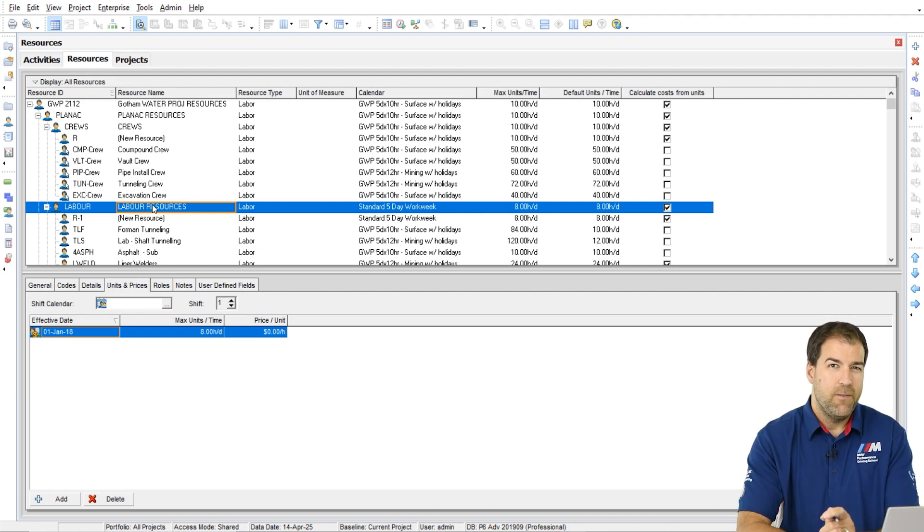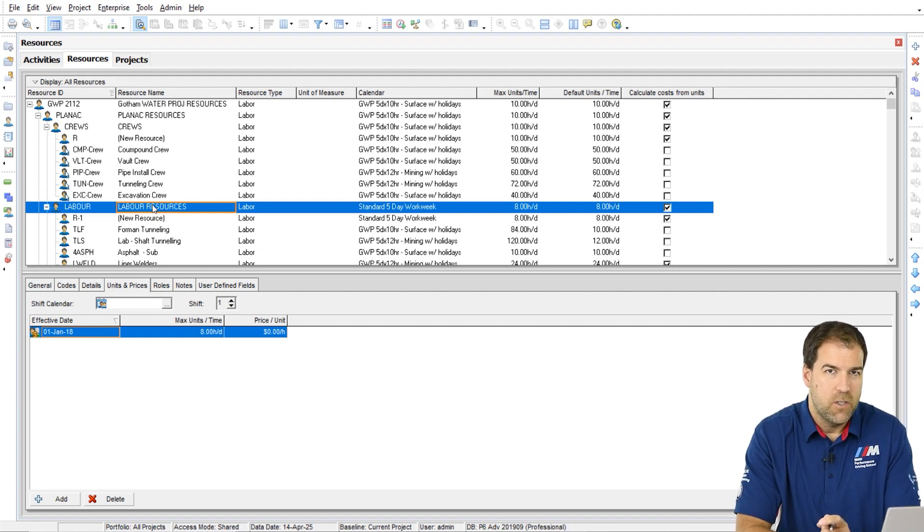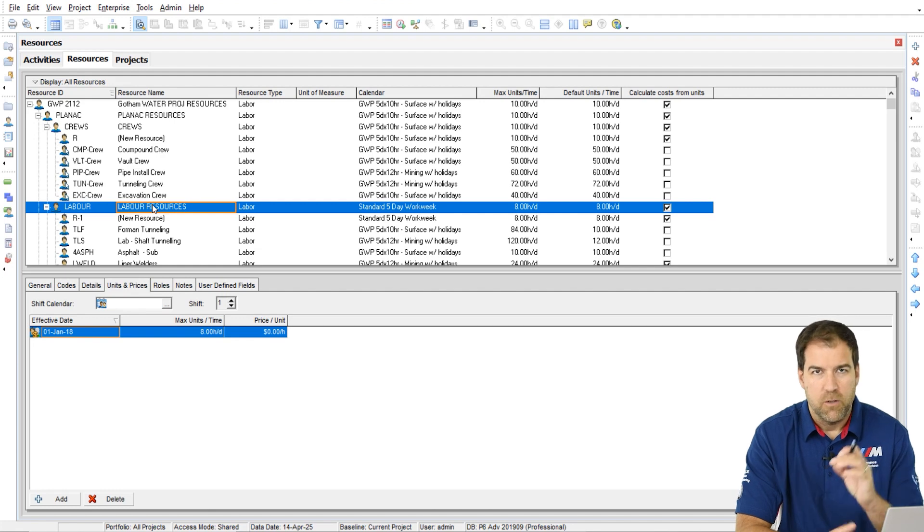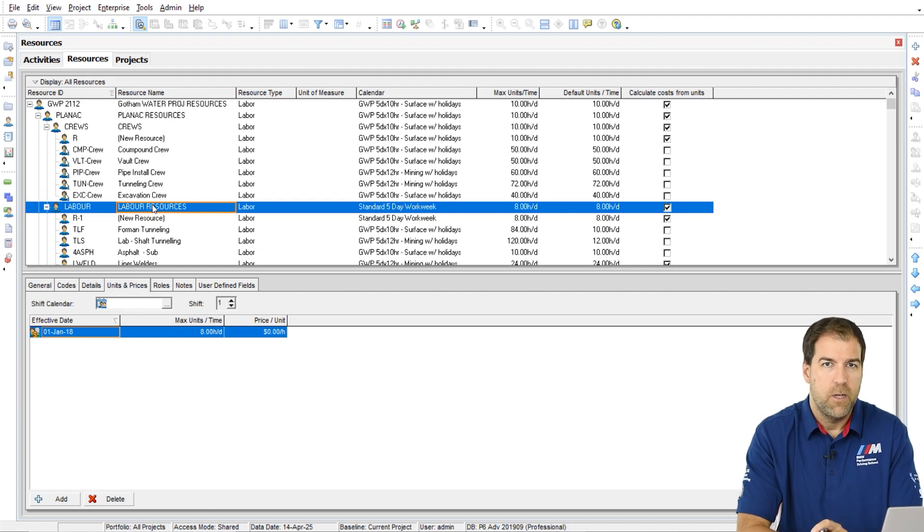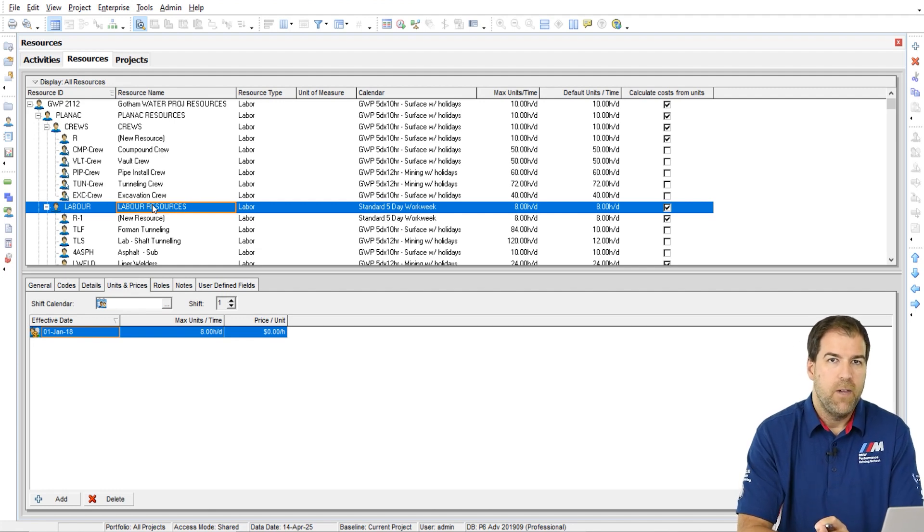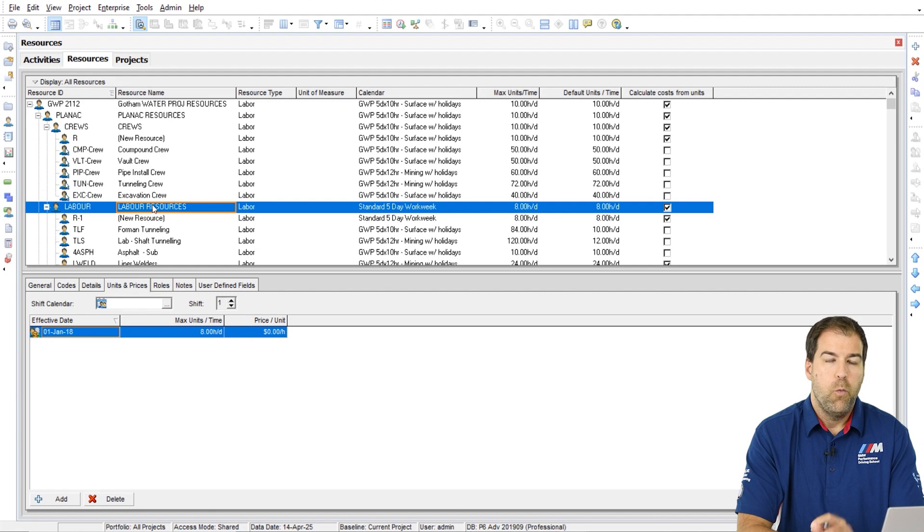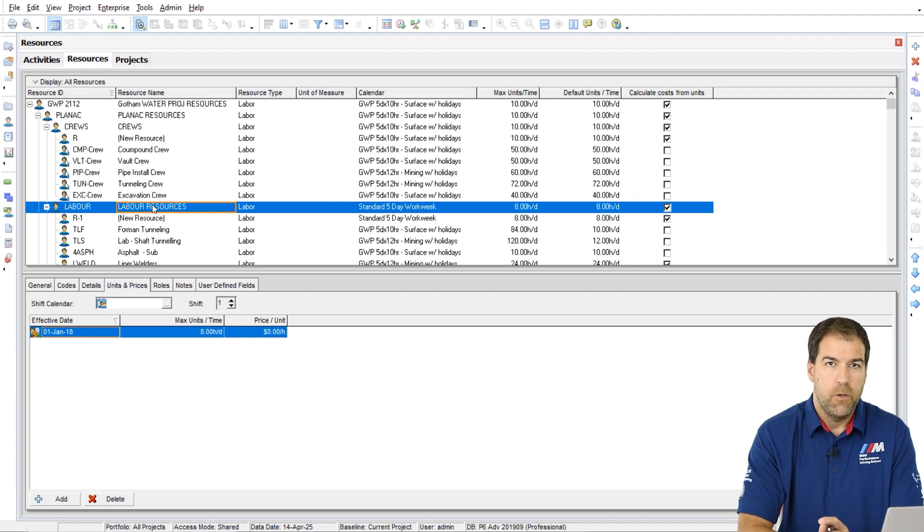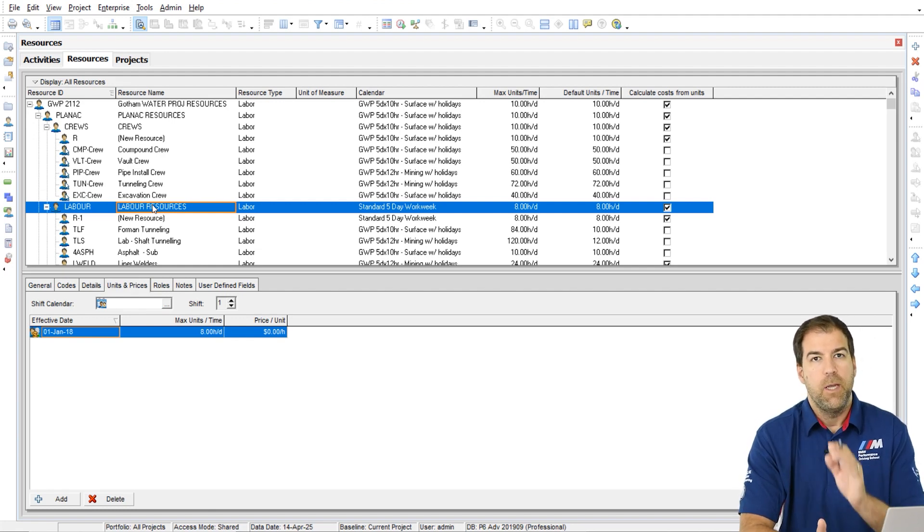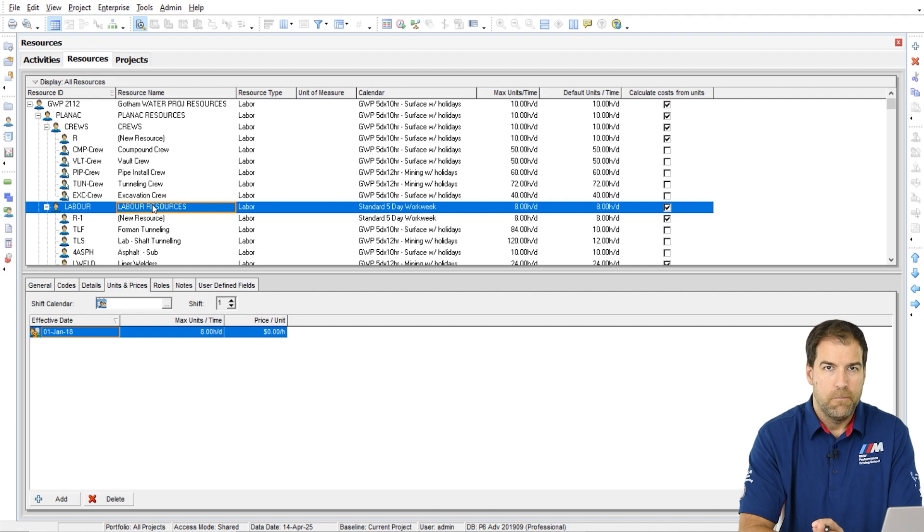Okay. So it's a bit of a complex issue. As you can see, I'm starting to talk a little bit of advanced planning stuff. Long story short, work in the hours per day for your units in time format. It's going to make your life a whole lot easier.